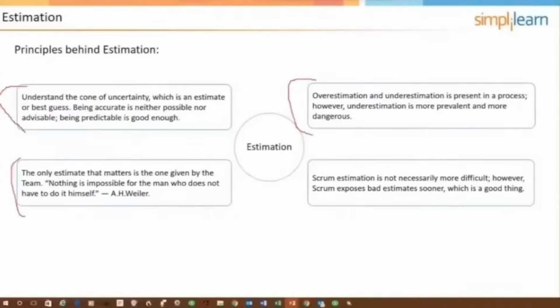And by looking at our velocity from iteration or sprint, there could be some information that is showing us that we're underestimating, for example, meaning we're thinking the user stories are smaller than they are, and that we can get a certain number done in a sprint, and then there's a fail. Well, that would be discussed during the retrospective, and then we would do something different going forward, which might include doing some re-estimating.